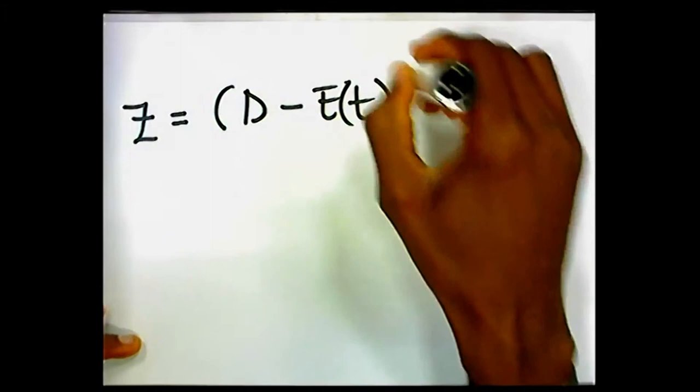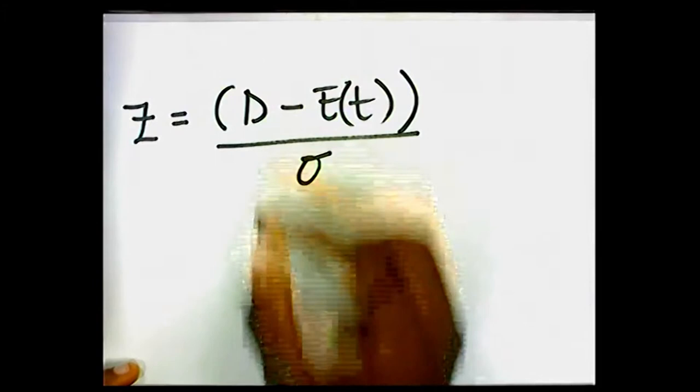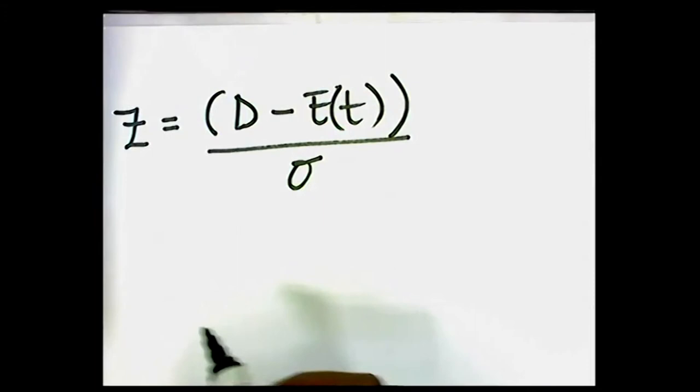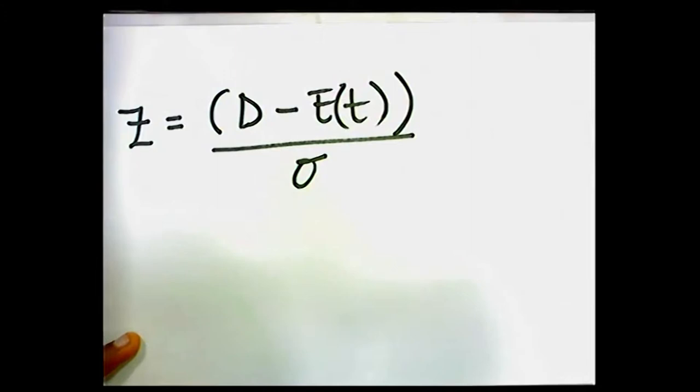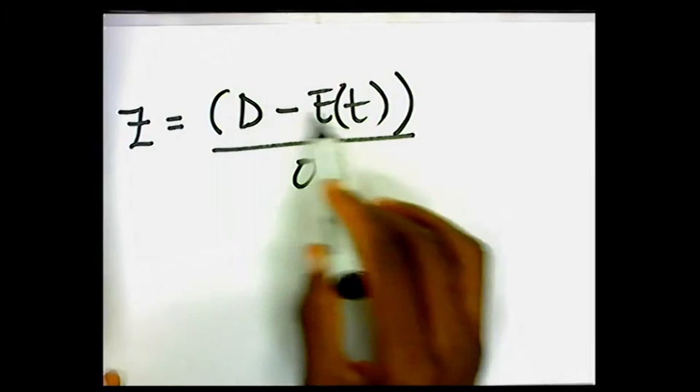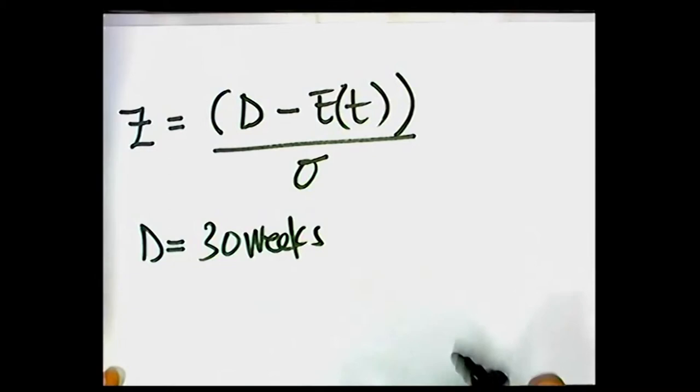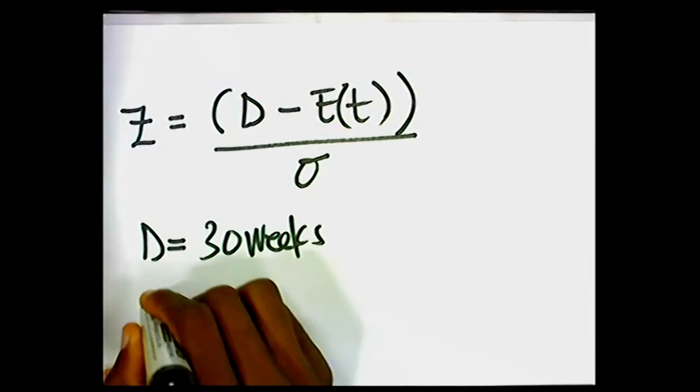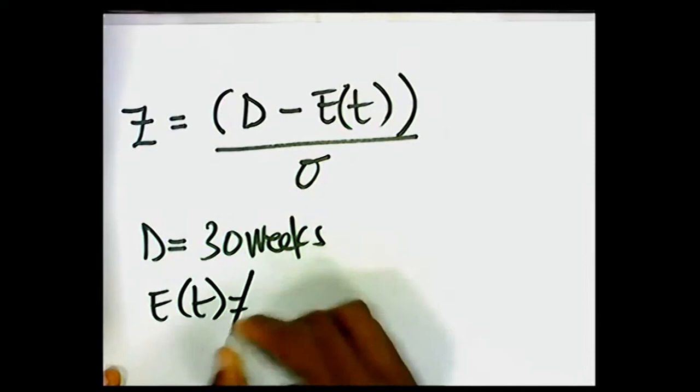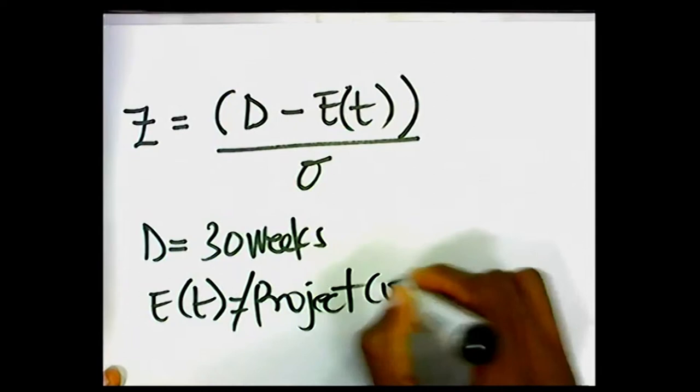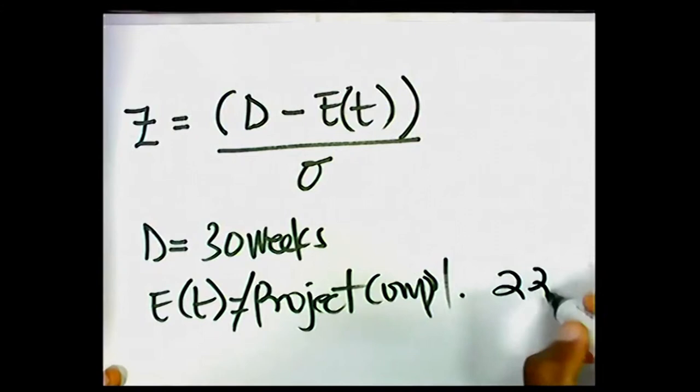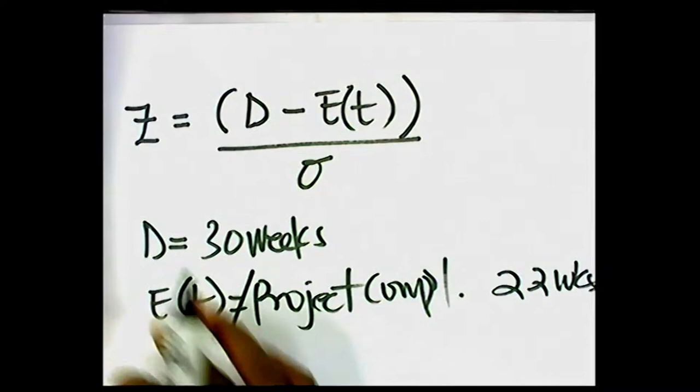So here, our standard deviation. And so like I said, we compute our standard deviation using the variance. And so for each activity, you wouldn't compute the variance for all the activities. All you need to do is to compute the variance for the critical activities. For these two values here, the d and then the expected time, this d here is the same as the 30 weeks, which is, in quantitative method, we'll say this is the sample mean. And then our expected time here is the same as the project completion time. So the project completion time, which in our case was 22 weeks.